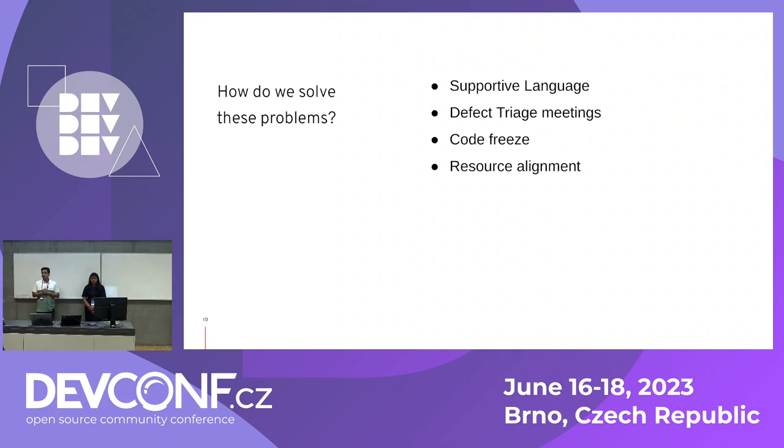And the next one is resource alignment. In the IT world, resource churn is very normal. Somebody is joining the company, somebody is leaving the company. The most standard ratio for developers to testers is 3:1, or as per the product and their experience, but mostly this is the standard ratio. So sometimes if there is a resource crunch, as a developer always push less code to the testing environment so that testers get time to test things, or help them.